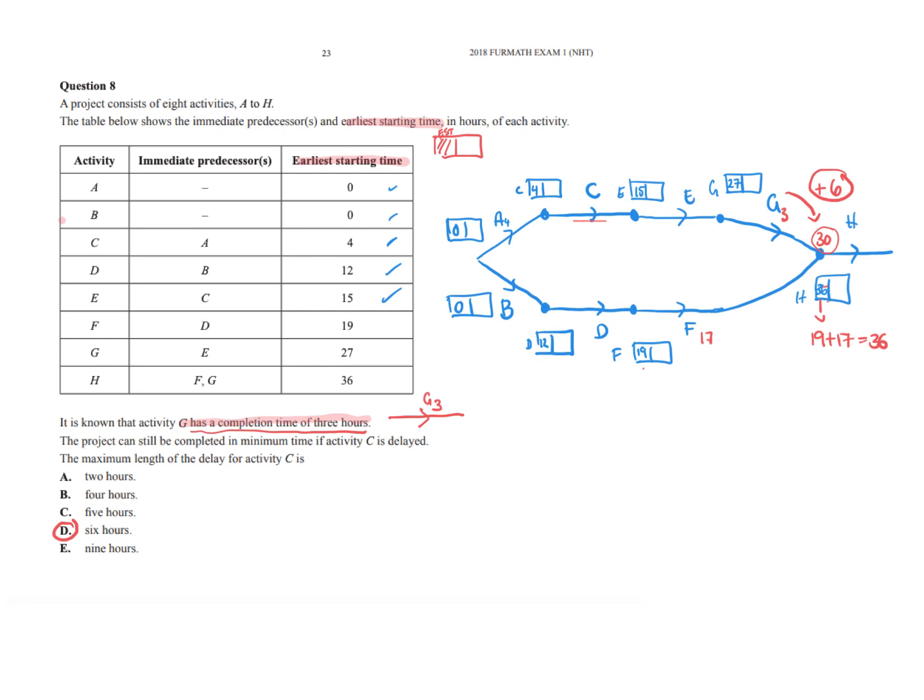And the reason we can change C as well is because the critical path has come along here, so it means there's only one way it would have gone that way. So that's the critical path. So if you're not changing anything on the critical path, you're not going to change the minimum completion time.